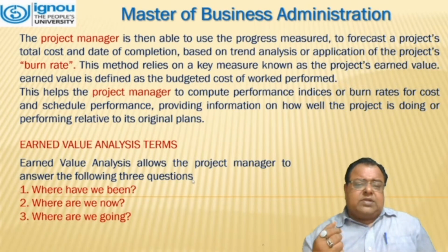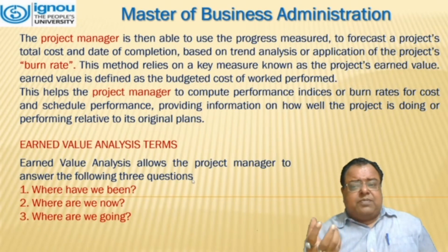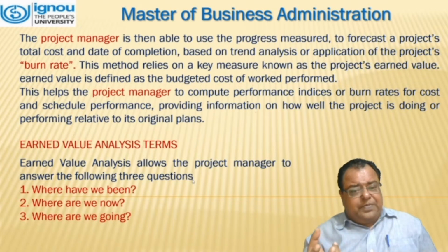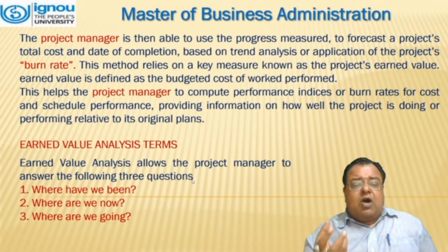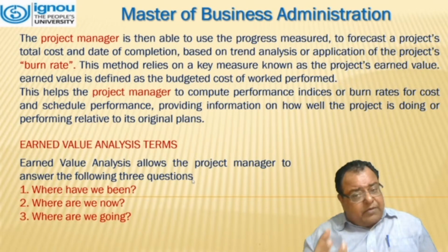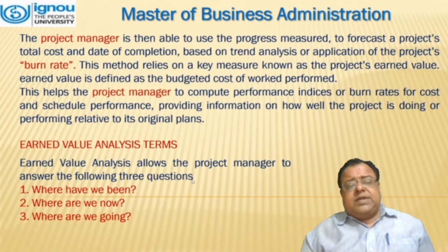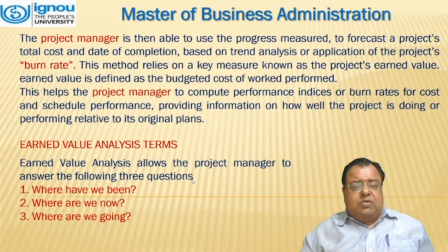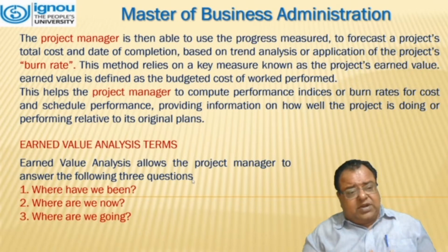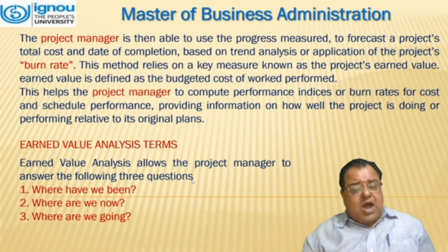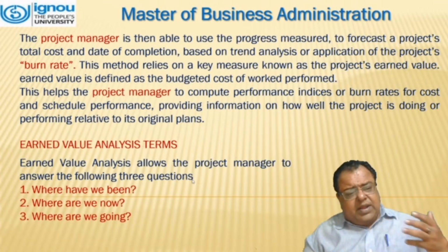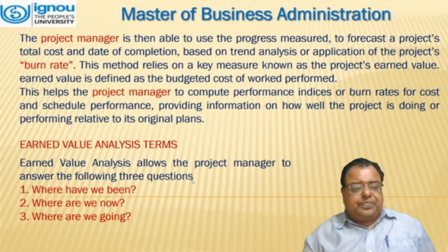This method relies on a key measure known as the project's earned value. Earned value is defined as the project cost of work performed. This helps the project managers to compute performance indices or burn rates for cost and schedule performance, providing information on how well the project is being performed relative to its original plans.